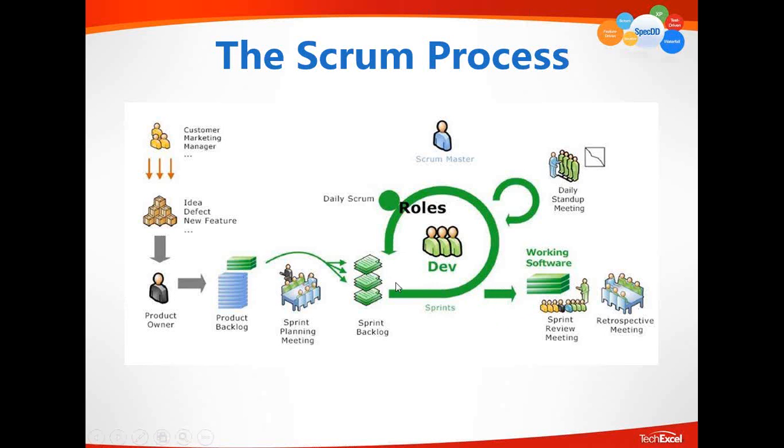And one sprint starts with a sprint backlog, which represents, on day one, the commitment of what the team needs to finish, all the features as well as the defects, and convert them into working software and deliver them so that the end users can use them. Every day this process is going, so this represents the daily stand-up meeting, the daily Scrum or the daily Agile.